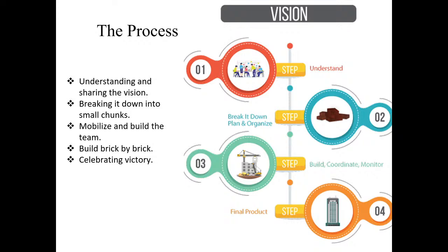So you'd have an understanding or design phase, or if it's a building, you'd do the feasibility economically, you do the architectural design, you'd break down to BQ, you'd draw a document of what needs to be done, who needs to supply what.